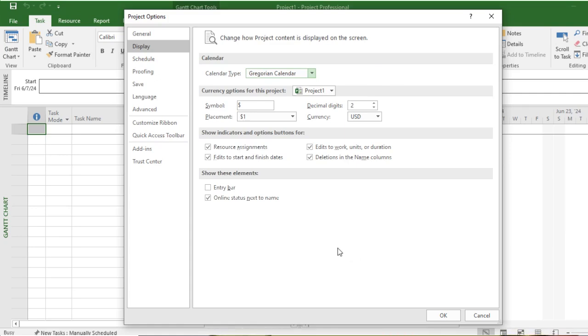creating a calendar is the way to let Microsoft Project know which dates in a year are working days and which are non-working days. The concept of working and non-working days I will clarify further later, when I describe how to create the calendars. But just as a small note, you may understand that a working day means a day that will be considered for work or planning of work, and non-working days are like the holidays, the important related days, special days, like when an election is declared.